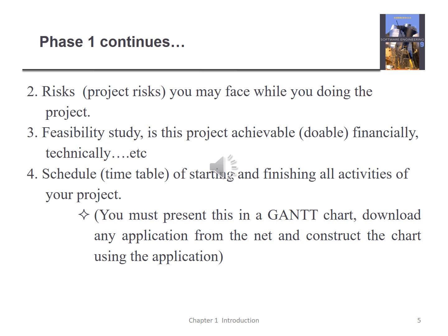So we pull one of these, download it, and reconfigure the application if it is applicable. We could change the holidays and the weekends, because they represent the holidays and weekends of the originator, which is usually from the West.